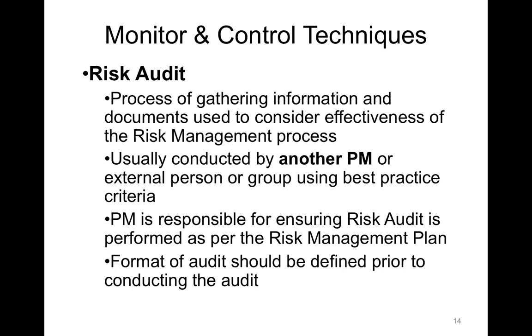So you, as a project manager, need to ensure that if your organization requires a risk audit, that it is conducted before the project is closed and the members are dispersed to new projects. So, of course, a formal audit should be defined in the plan prior to conducting the audit.